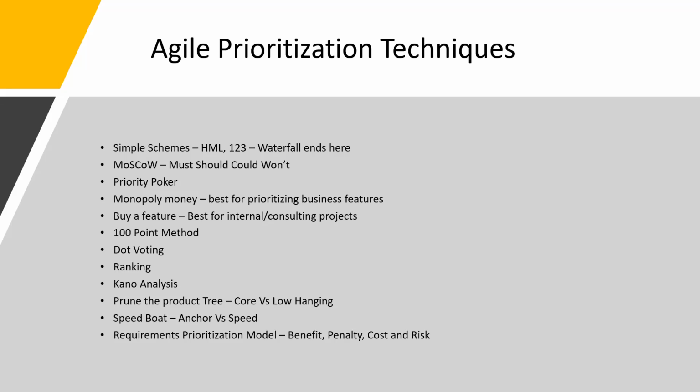Always remember that you can use any of these at any point to suit who you're working with. For example, planning poker is very easy to do with developers, whereas MoSCoW is very easy to do with the users and customers. So you need to decide what to use when, based on what audience you have in that particular session. Always remember that.